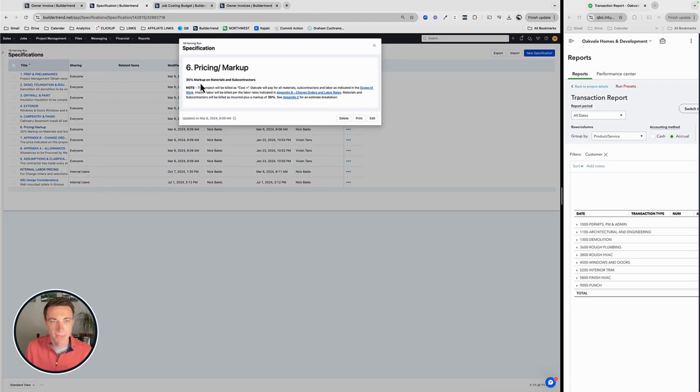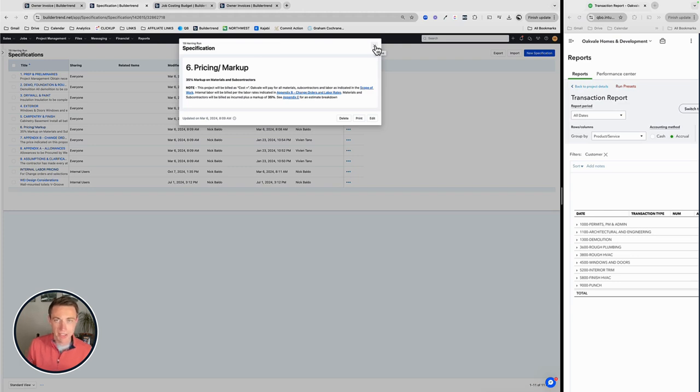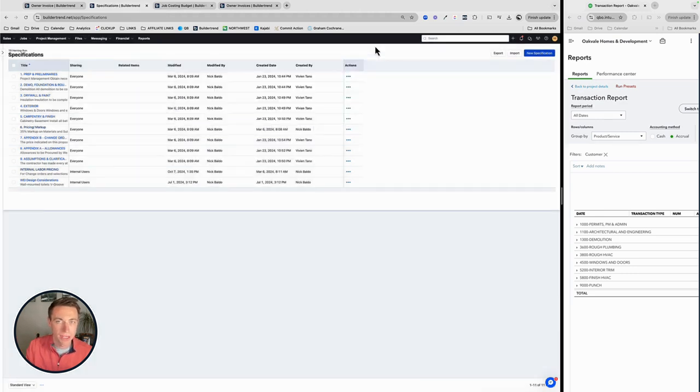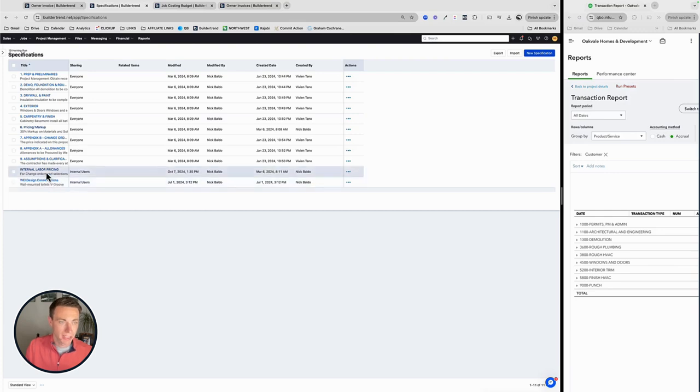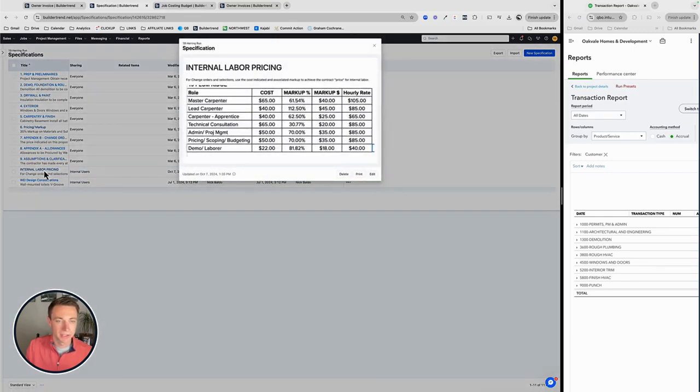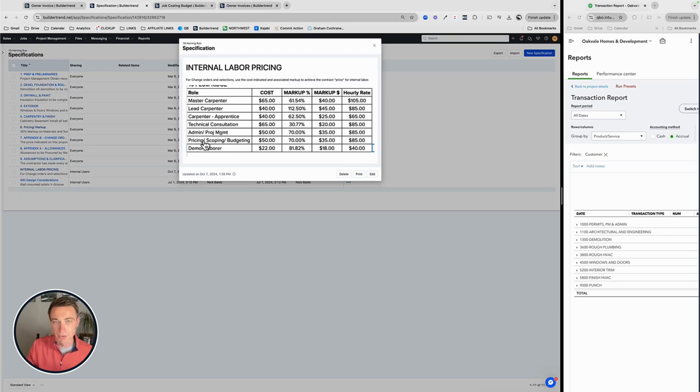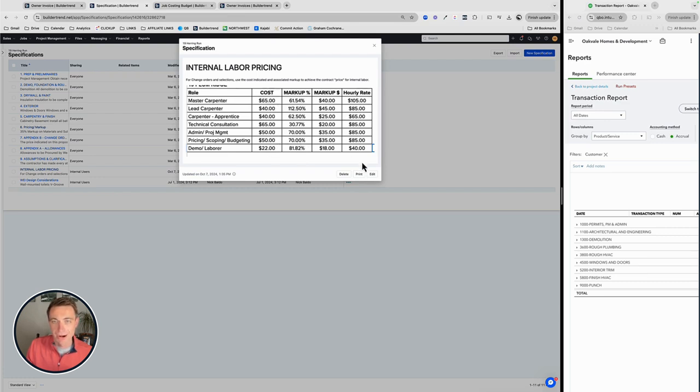In this case, I've got my 35% markup on materials and subs. And then the other thing we do is labor. Labor is a little bit interesting because what we're doing with labor is we're telling BuilderTrend what my cost is for an hour of labor. And then we have, we need to mark it up to get to our price. And so labor is a little bit different. I've got these roles that I use, my master carpenter, lead carpenter, etc. And the actual human being is going to record the time clock, but I'm going to, or my VA is going to understand who that person is, what the markup is going to be to get from our cost to our hourly rate.